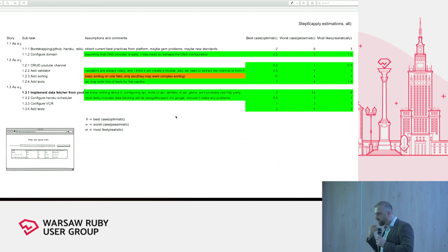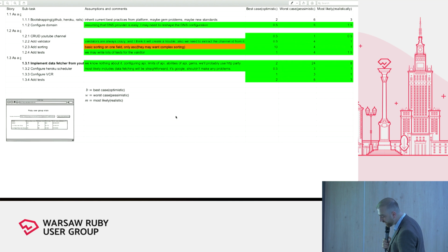And then I would think again realistically, okay, 2 hours was too optimistic. Definitely there will be some problems. The client wouldn't provide the API. Maybe they wouldn't add the proper permissions. Definitely there will be a problem. So I'm saying realistically it would be 8 hours. So this is interesting, as you can see why the best case, worst case, and most likely are really helpful for us.